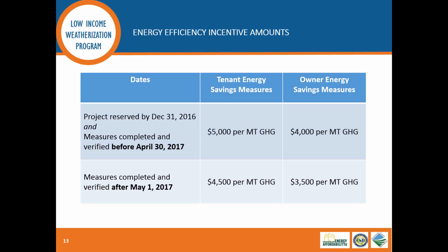There are projects coming through that may also be getting federal grants or HUD grants, or for whatever reason they're accessing other funds that are triggering prevailing wage, and that then triggers it throughout the project. But the LIOT program itself is not going to trigger prevailing wage. And so we don't need to see that information in the paperwork that the contractors are providing.